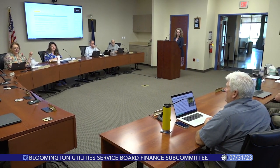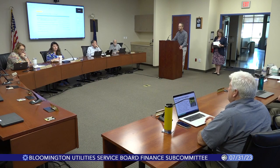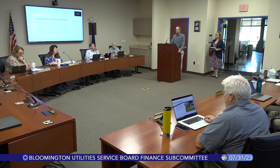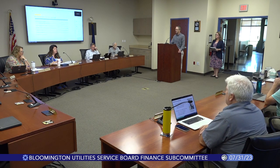What master plan? The master plan that we did a couple of years ago, 4 years ago now. The engineering company was hired to do a master plan of the site. And then, like Vic said, the numbers were older. They were, I think, 2019, 2020 numbers, and then things really escalate. We see that a lot on our other projects that were estimated before the pandemic. And so we adjusted those costs per square foot for the use of the building. And then that's where we came to the $44 million. That includes utilities and site grading and all the aspects, asphalt, concrete, all those are included in those total costs. It's not just the building.